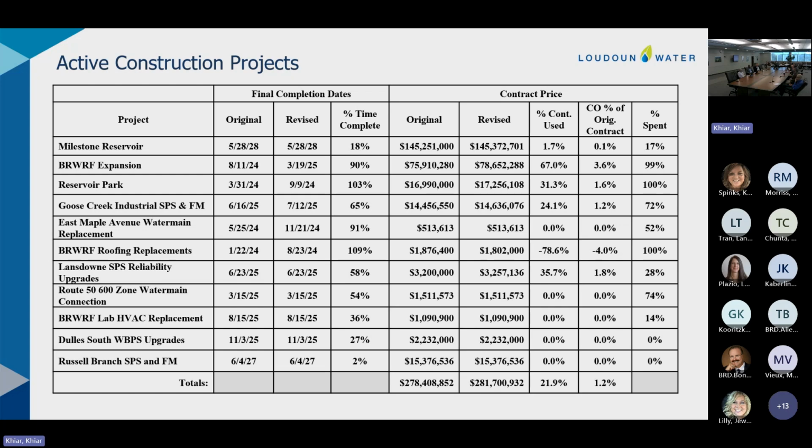If I could just add, overall, we're seeing lead times and stuff get better. I think the one area that there's still a struggle is on the electrical side, both with contractors to perform work and then lead time on equipment. So from my perspective at the higher level, that's still one area that I have concern with, but we do what we can to control it. Same things occurring on the commercial side.